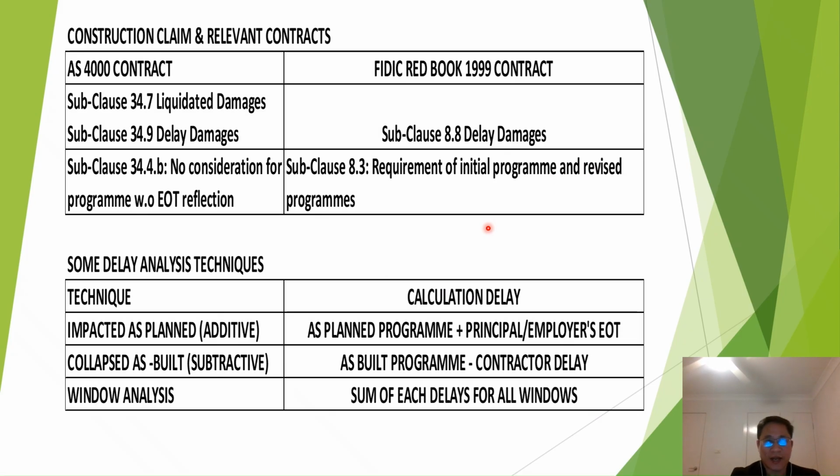I want to mention that for the AS contracts and the FIDIC Red Book 2017, liquidated damages is the same as delay damages in the FIDIC Red Book. So we won't get confused when comparing between these types of contract.